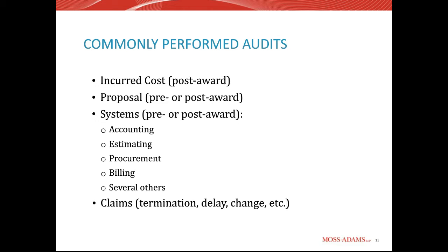And so either way, you wait to have that year completed. The incurred cost submission is going to include schedules on all your contracts and how much direct cost by cost element is being claimed on those, plus your indirect rates that are going to be applied to those direct costs on that contract. And then that claim is what is audited, either by a prime contractor or by a government agency.